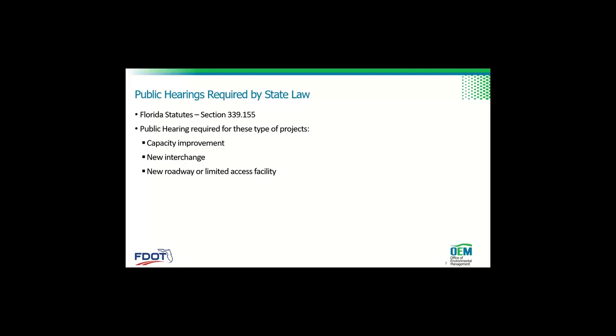And I want to say this because it doesn't relate just to PD&E, but I hear every now and then someone say, oh, we're not required to do certain notifications during design or during construction. I just want you to keep this in your mind that Florida statute requires that all meetings, hearings, and workshops, regardless of the phase that they're in, require that you notice that meeting in the Florida Administrative Register and on the department's website. So please keep that in mind.